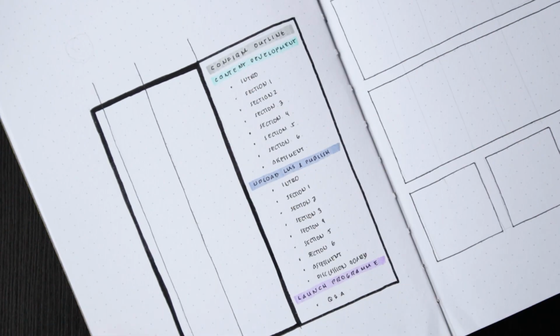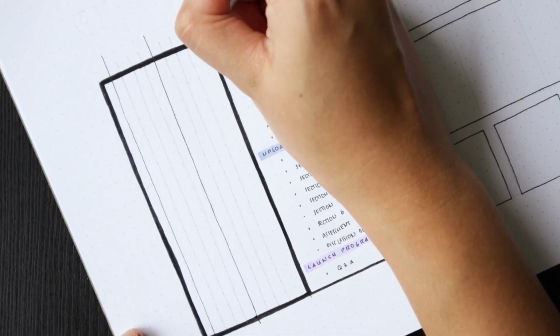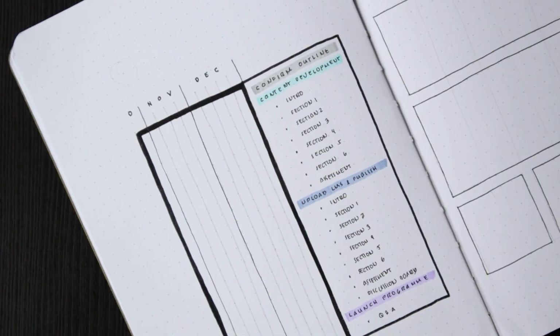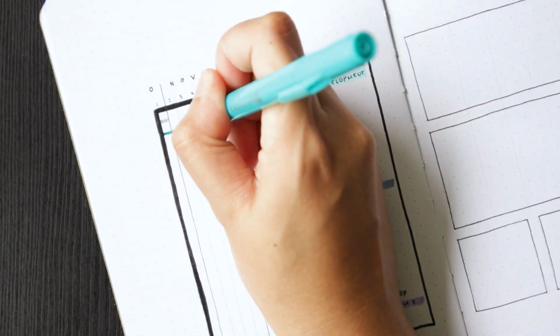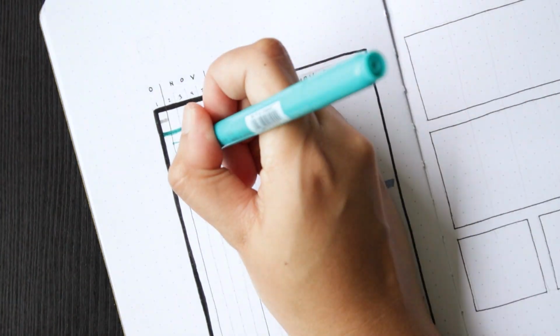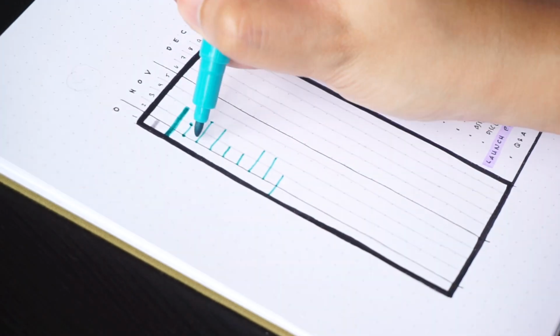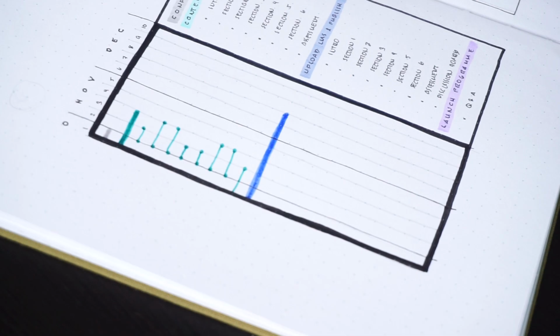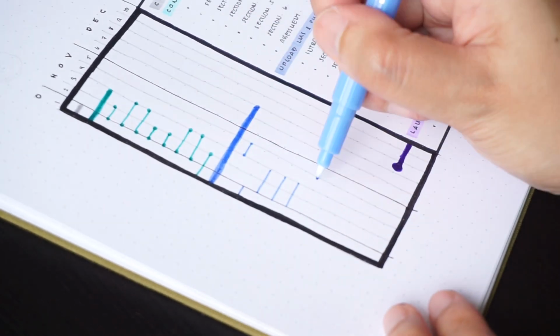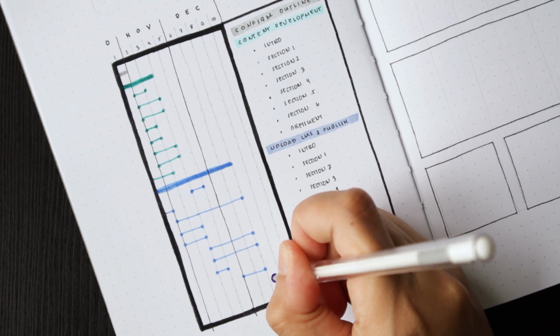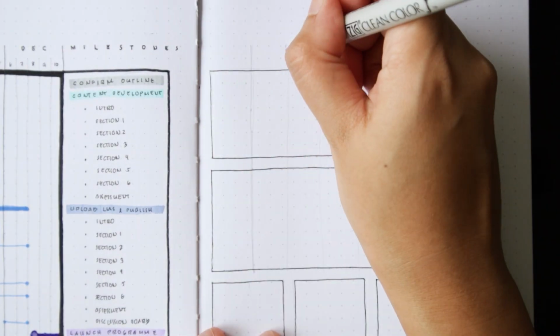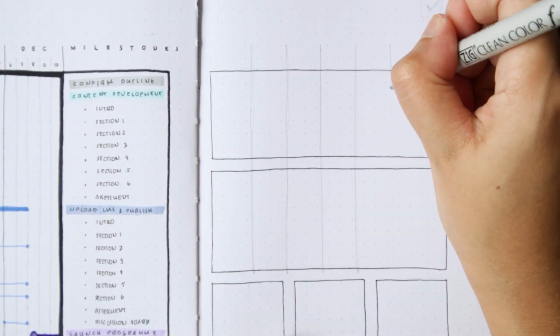Which leads me to my next step, which is to plan out my adjusted timeline. So what I'm doing here is I am drawing the timeline for each of these phases as thick lines, and then the breakdown timeline for their corresponding activities as thin lines, and then I'm just drawing a star to indicate the target milestone.